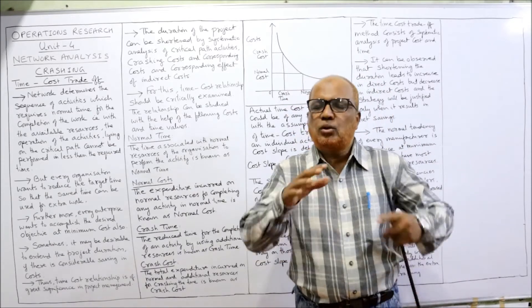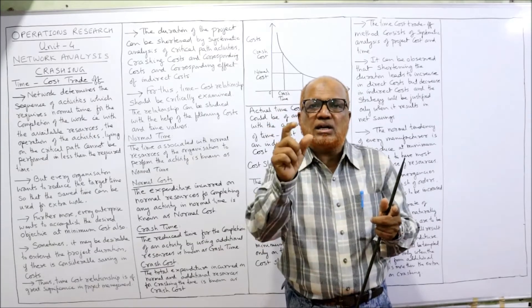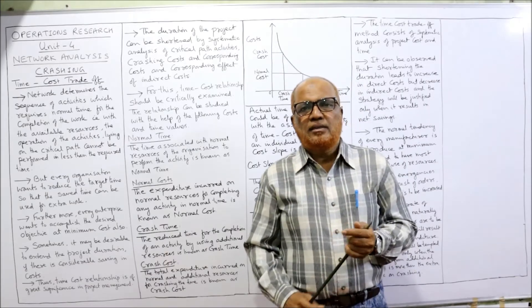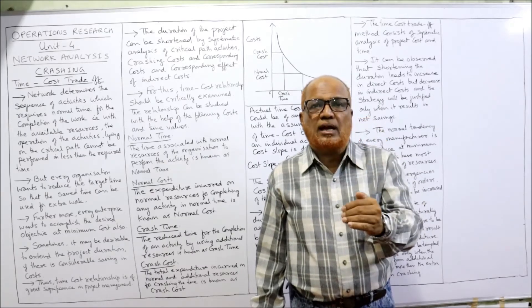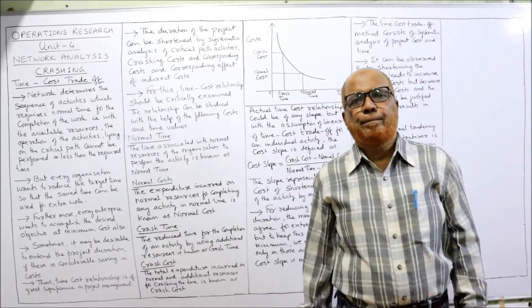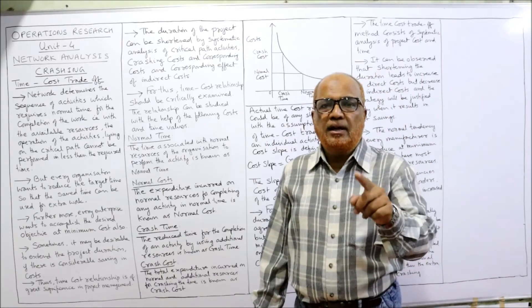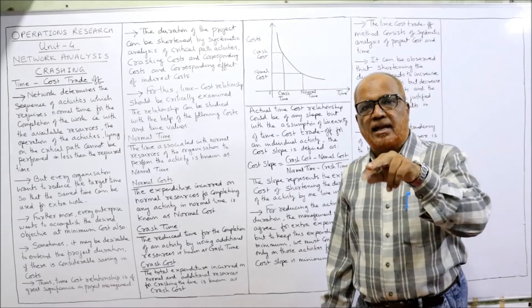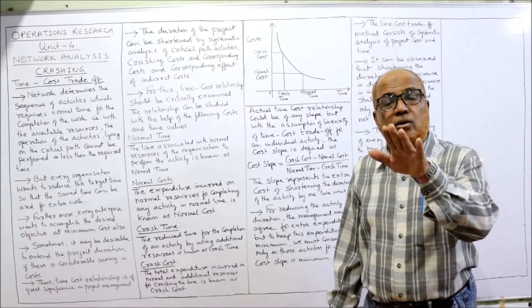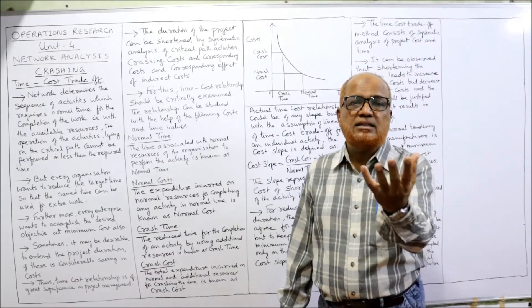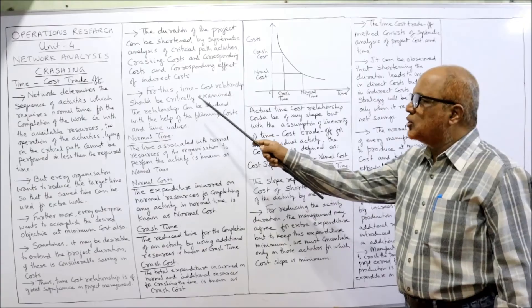To shorten the total project duration, the project manager has to crash the duration of critical activities — that is, reduce the duration of critical activities by applying additional resources. When additional resources are employed, direct cost will increase but indirect cost will reduce. Two types of cost exist in any project: direct and indirect. When additional resources are employed, direct cost increases but indirect cost decreases. The management has to assess the net effect of direct and indirect costs, and the time-cost relationship should be critically examined.